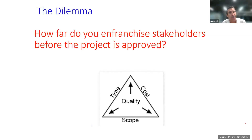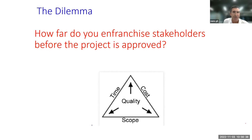But what we know is that if you just do that — consult unilaterally — it will be fine from a cost-benefit analysis perspective, but you are probably going to face significant cost growth once you actually start to engage in consensus-oriented negotiations with stakeholders. On the other hand, if you enfranchise them too early, you start making concessions and compromises that put pressure on cost growth, while those benefits are not captured by traditional cost-benefit analysis. People then ask: why should we proceed with this project? This is a real dilemma that we are just beginning to tackle in the project management literature.